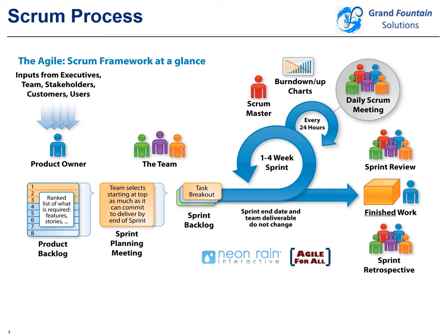Then they design, code, and test the requirements in the sprint backlog, and release the code for user acceptance. The team meets daily to discuss the progress in the sprint, and this is called the daily stand-up.